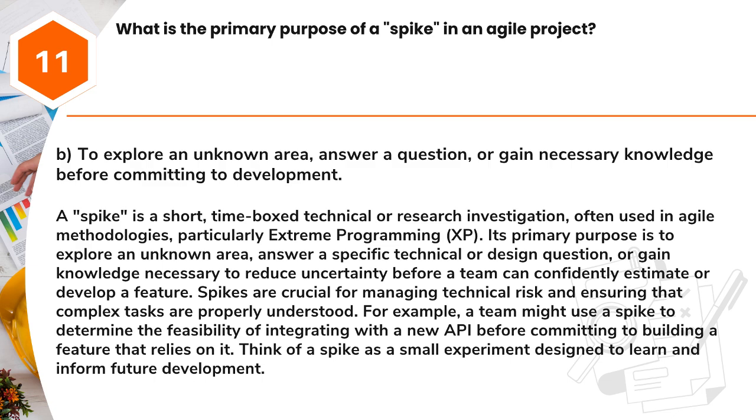Spikes are crucial for managing technical risk and ensuring that complex tasks are properly understood. For example, a team might use a spike to determine the feasibility of integrating with a new API before committing to building a feature that relies on it. Think of a spike as a small experiment designed to learn and inform future development.